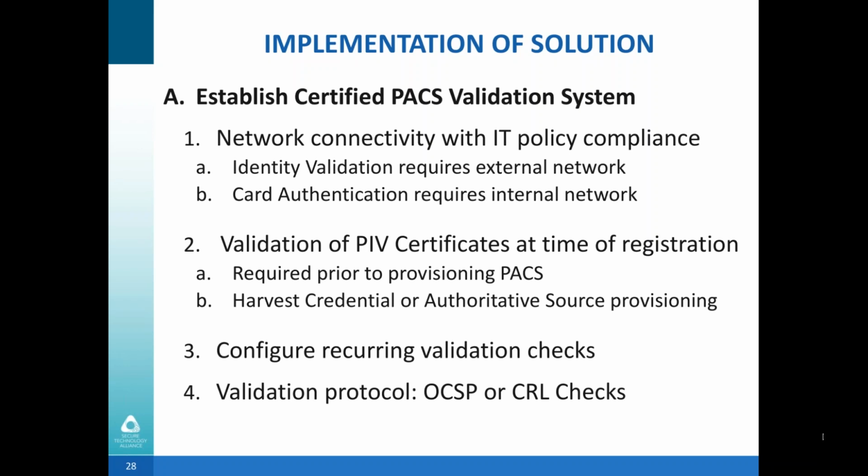Typically, you would want to enroll credentials while the hardware is being installed to allow operational cutover when ready. So a decision needs to be made at the start to perform the card provisioning with validation, or to cache the certificates to be validated later in a batch process. FICAM compliance requires that this be performed before provisioning or at least before going operational. Card authentication requires the internal network and can be performed without an external connection. But the initial revocation status check for enrollment and the required schedule checks will not be up to date without an external validation update, and therefore the connection. Next slide.